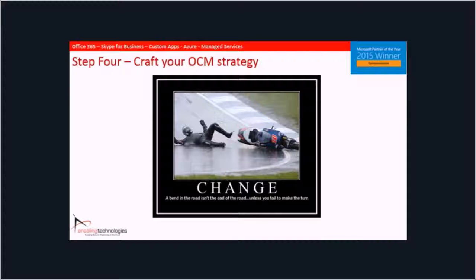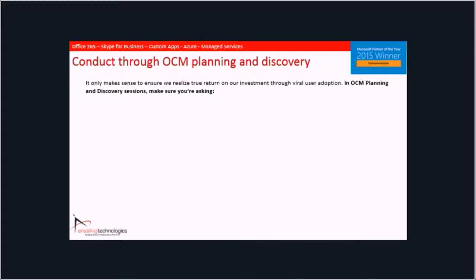I would contend that this is the point where we need to have meaningful conversation around our OCM, or organizational change management strategy. Far too often I have this conversation with clients maybe a week or two prior to the pilot starting, which effectively erases any runway that we could have had to craft our message, to make communications meaningful, to build a good communications thread with users, to get them excited. So again, as part of your planning of your migration strategy, make sure that you're at least incorporating a few of the basic change management strategies that we have here.